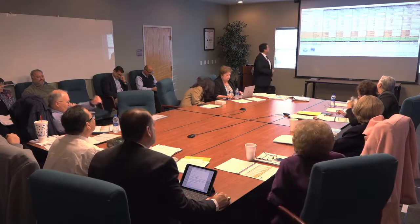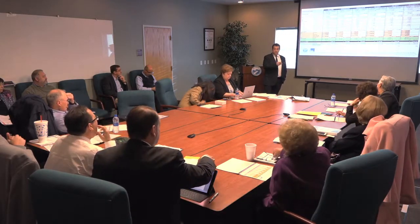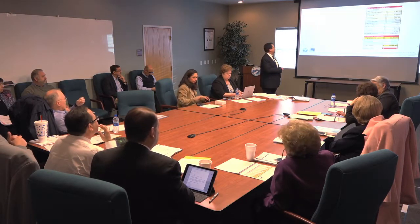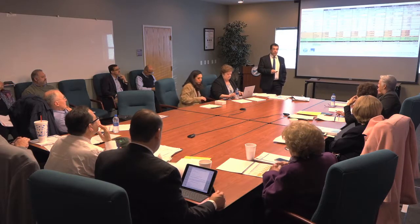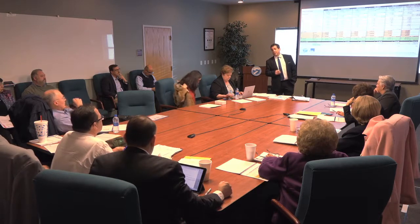So as you can tell, it was 1%, and I've been telling you that I may have to ask Ms. Chauncey for some additional funds from the contingency from this number here. That is not going to have to happen, thank goodness, because as far as the equipment, we're over budget by enough that we feel like we're going to be able to cover those expenses. Unless there's a big surprise right there at the end, I think we should be fine.